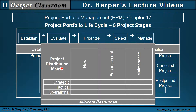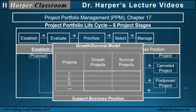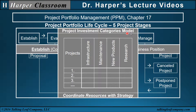The project distribution matrix considers the strategic, tactical, and operational focus of projects and places the projects in a cell based on whether they are new, enhancement, or maintenance type of project to allocate resources that enhance a particular business strategy. The growth survival model considers projects as either growth to enhance the business position or survival to sustain a business position, where the mix of projects will support the business position now and for the future. The project investment categories model coordinates resources within a business strategy by identifying projects as infrastructure, maintenance, new products, or research, with a focus on the effective utilization of the resources.